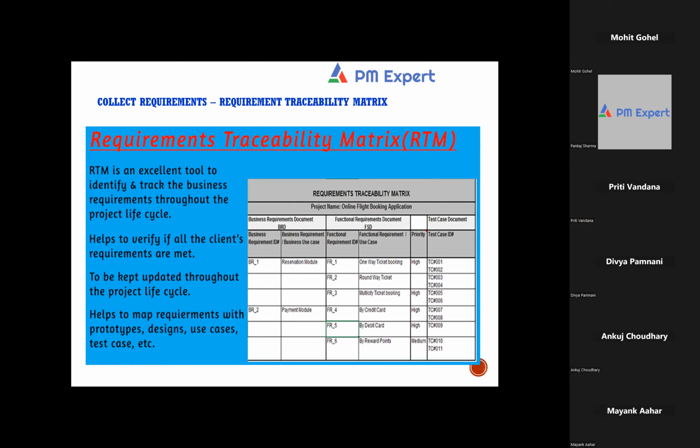And who should put in these requirements? Should it come from the product owner, or should it come from the project manager? You require BA skills for doing it, right? For creating a requirement traceability matrix, you need typical business analysis skills. So it can be a member of the development team who is a BA, who has a background of BA. Because product owner is a very broad function, right? So product owner might not have the time to complete this.